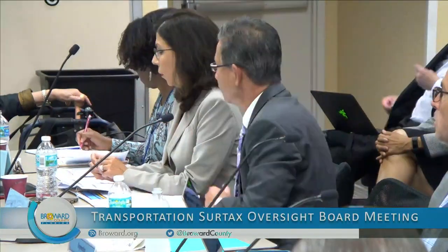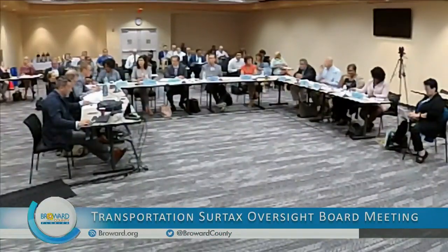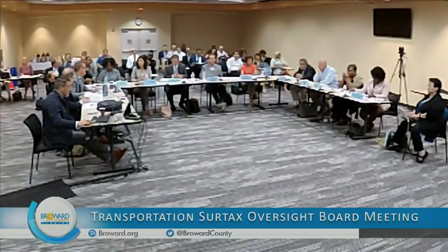Can I please make one quick point? One thing that may be worth noting for the public is that these cost estimates, as best I understand, and obviously this is your area, so you can jump in, are estimates based on prior projects. Right. So as these go forward, we're going to get estimates for these actual jobs, so the estimates are going to change.